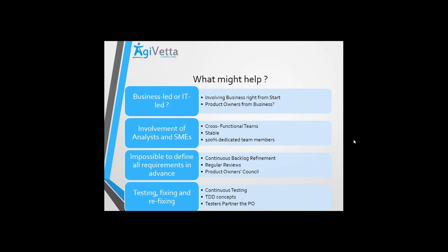It is also important to do smart testing, as I've always been saying, because when we talk about running tests for a BI project, it can actually become a mountain of test cases. So what you need to see is how we can continuously reduce the test set, because automation may not be as possible as it is in a typical IT project or a development project. So your friend here is continuous breakdown of test cases, some smart testing, and impacted area analysis or critical path analysis techniques, so that you are able to control some of the data sets that you need to test.